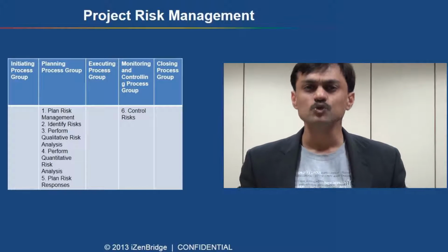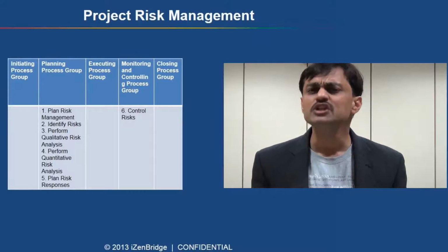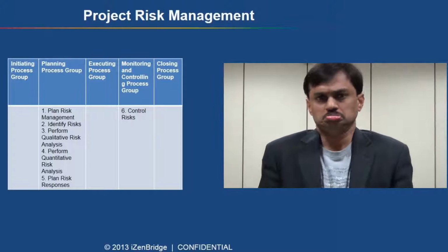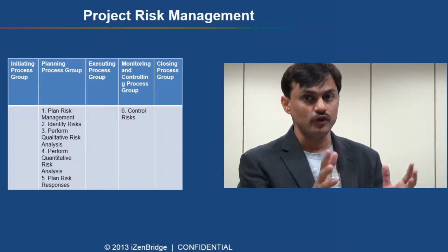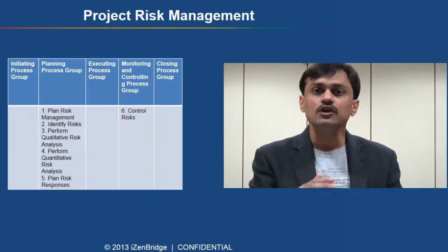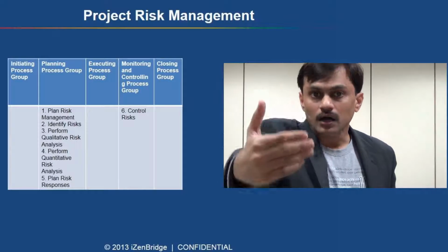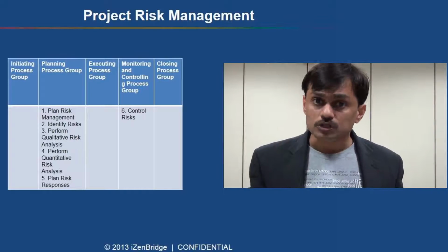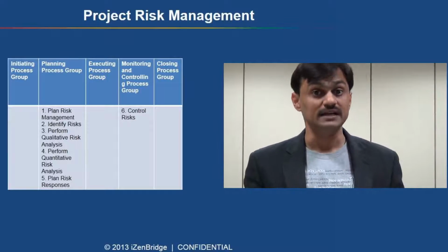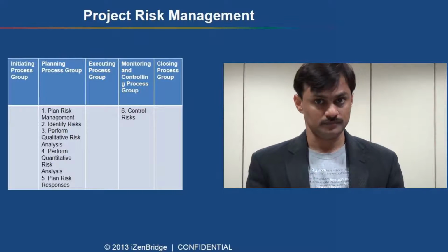After that, we need to respond to the risk. We can use various risk response options, like we can think of avoiding the risk by way of changing our approach, or we can think of taking outsourced work or transferring a risk to someone else, or we can also follow mitigation or contingency reserve strategies.